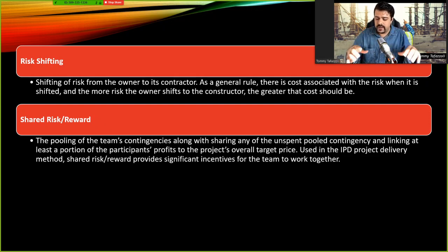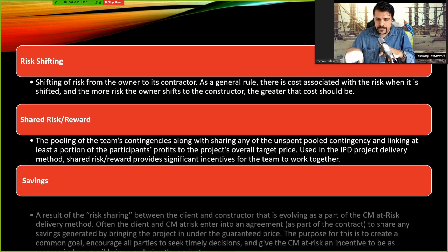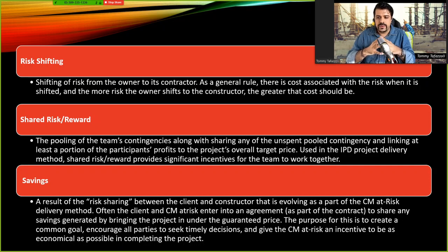They should be involved in the entire risks, and also the rewards are similarly shared between players. For example, if there are some savings at the end of the project, then they could share it between themselves. This is based on the initial contract or agreement that everybody has signed. I mean, how the savings should be shared or distributed between players should be decided upfront in the contract. Yep, savings are kind of rewards.